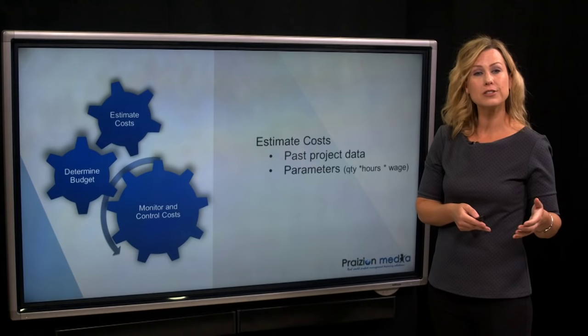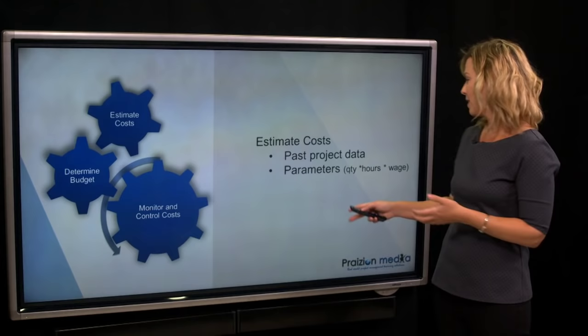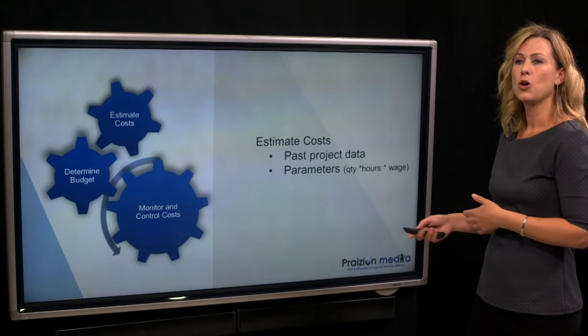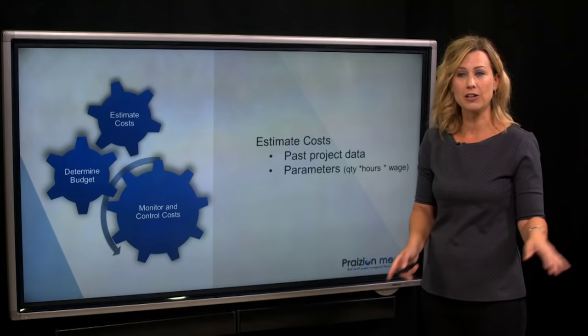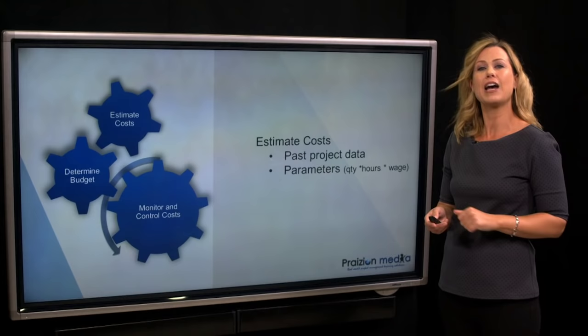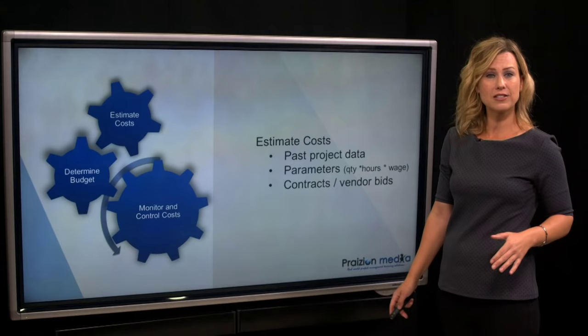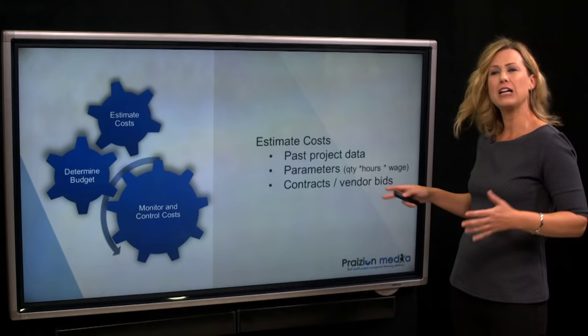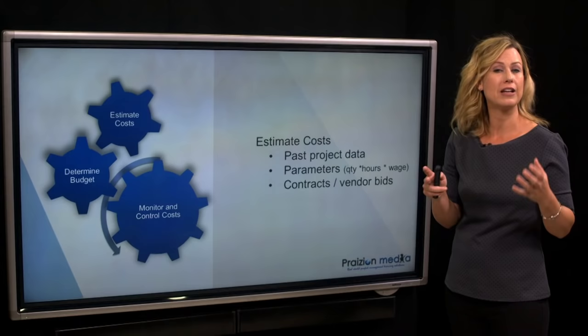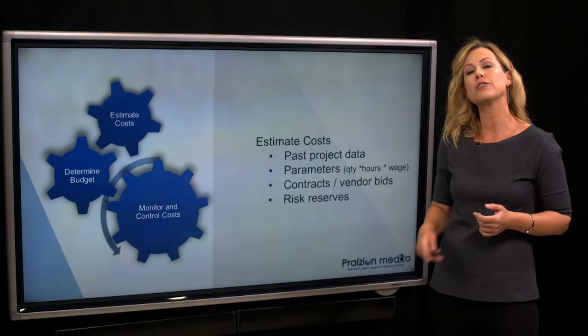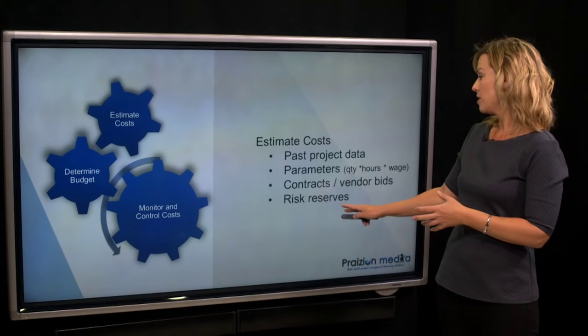A parametric estimate is where you literally say how many hours do I need this resource — people, materials, equipment, facilities — how many resources, what's their wage? This might be very accurate because you've already agreed on the wage and hours. Or it might be murky because you're not quite sure how many hours you need. You might have very confident estimates because you've got a contract signed with a supplier, or you might be close to accurate because there are vendor bids and you know the general cost. But risk reserves — a lot of us don't know how to analyze what could go wrong and how much that risk will actually cost our project.